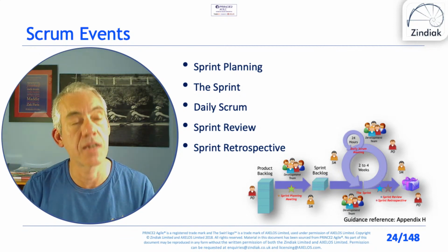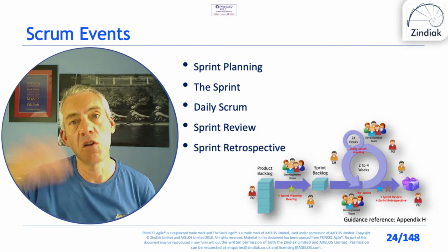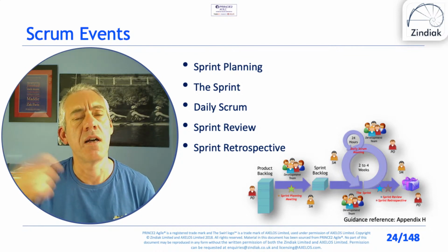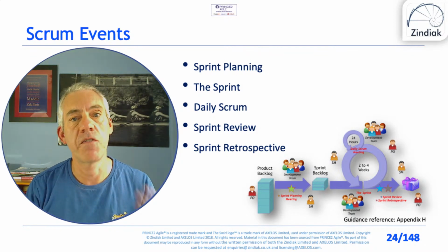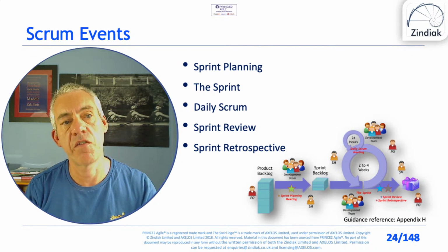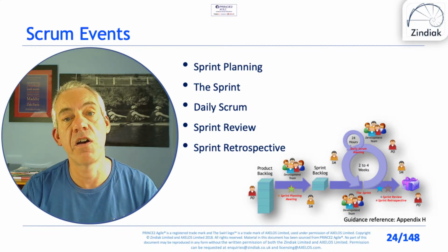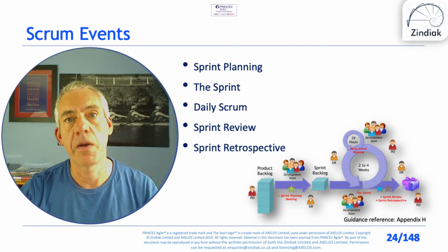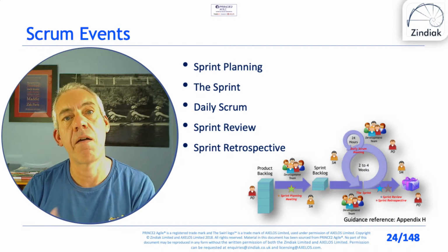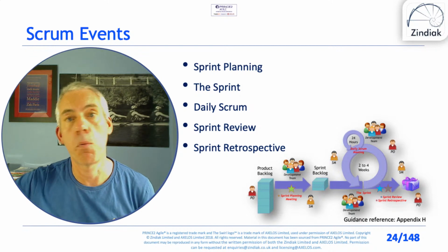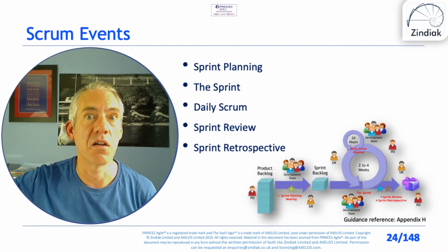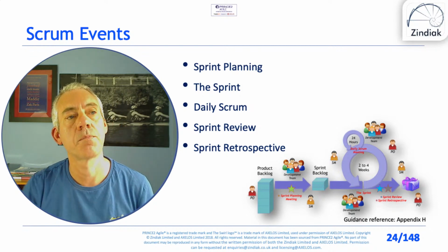It is 4 weeks. And what we're looking for is repetition, to get a drumbeat going, so that the stakeholders know if it's 4 weeks, they know there's a sprint review and a sprint retrospective every 4 weeks. They know we're going to deliver a product increment every 4 weeks. They can put it in their diary and expect it and plan around it, and maybe operations or the people who are actually going to release it can plan around it as well.